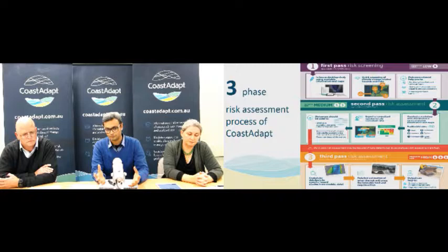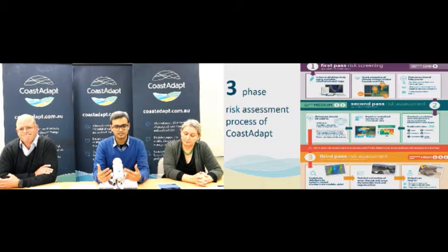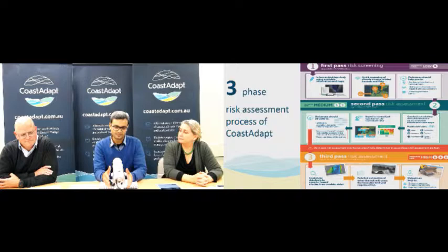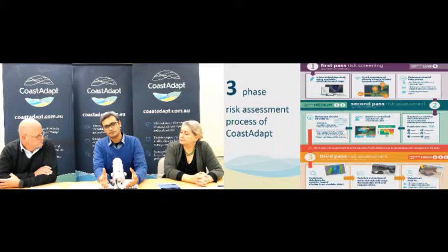And as you identify any critical risk through second pass risk assessment, third pass assessment is about narrowing down to that particular risk at a site-specific level, and then engaging with a consultant to commission hazard studies so that the consultant can build some biophysical models and can tell you more detail about the rate and approximate time in future of future changes, so that you can start thinking about thresholds and triggers, and that you can ultimately use for planning your adaptation actions down the track.